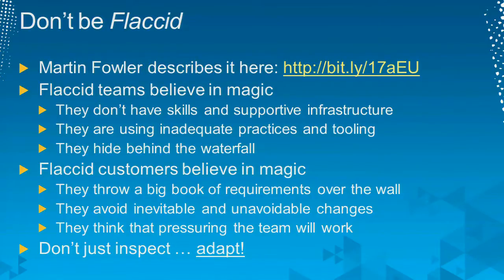But there's no inspecting and adapting. At the sprint review, you're showing the increment, people are nodding their heads, you go back and you do another one. There's no energy there to say, let's look at the backlog, let's put some new things in there, let's adapt what we're building based on what we're seeing. Or even more so during the sprint retrospective, where the team says, okay, what went well, what didn't go well, what do we want to change for next time? And either nothing's identified or nothing gets changed.